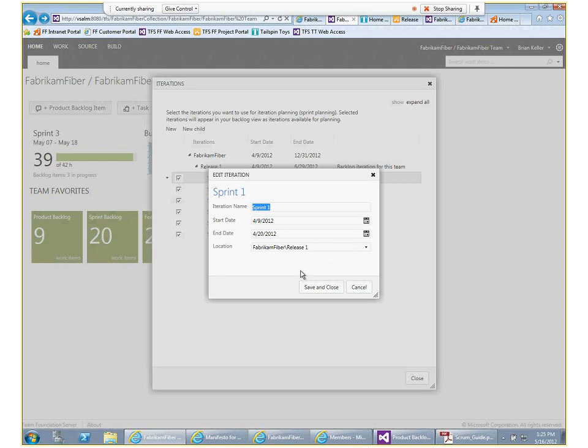So right now we don't have this anymore on this particular version. So I'm having to adapt by using a PBI or a new item that I'm calling just retrospective results. As you can see here, I can configure my sprint with a name. Notice that the tool itself says iteration name, which is basically in Scrum using sprint as the iteration name. The start date and the end date, and the location in TFS work item hierarchy, right? That is, I'm saying that this is going to be within release 1, as an example.